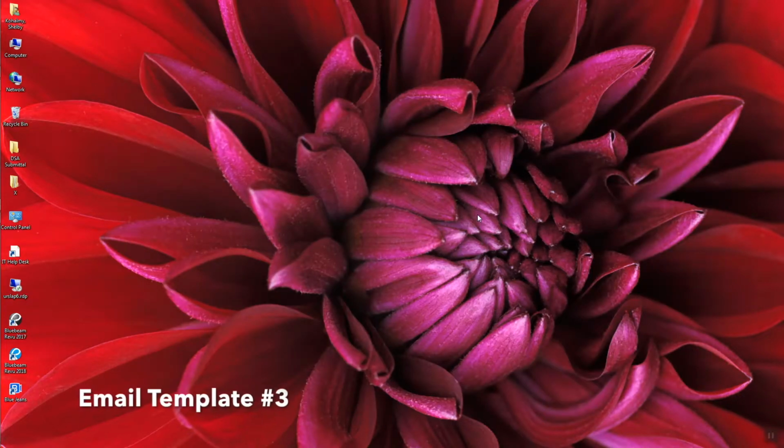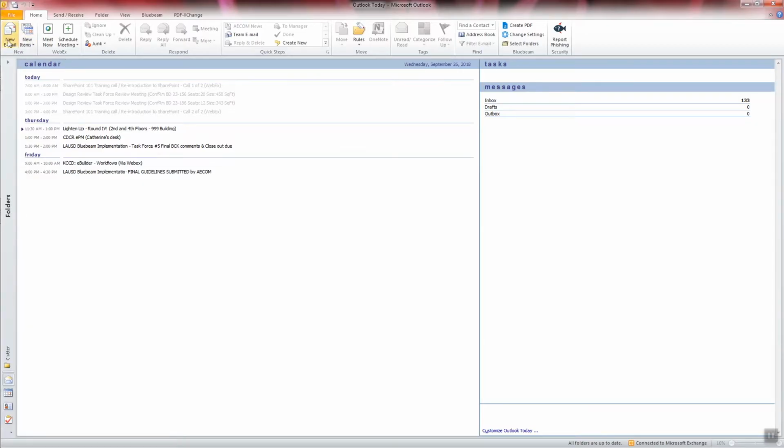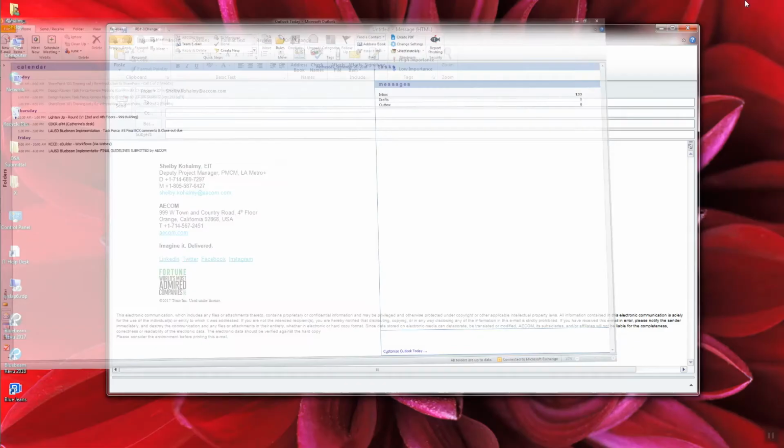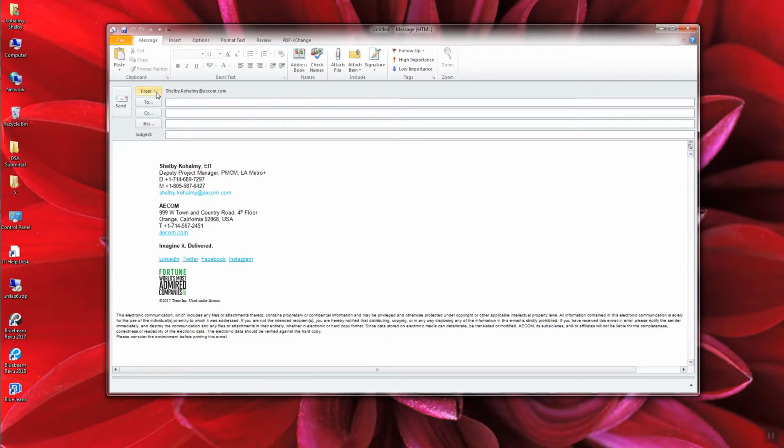Template email number 3. Post-approval document is rejected. Open Microsoft Outlook. Select New Email. Ensure in the From field the DSA EPR Regional Office email address is selected. Send email to the Design Professional of Record. In the subject line, state the application number and the project name.